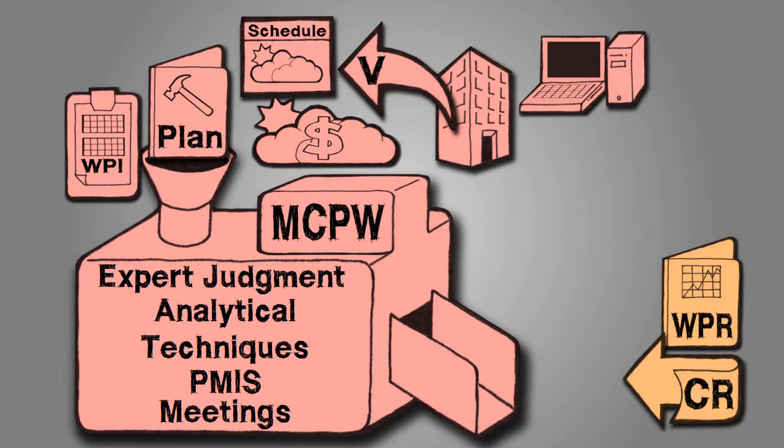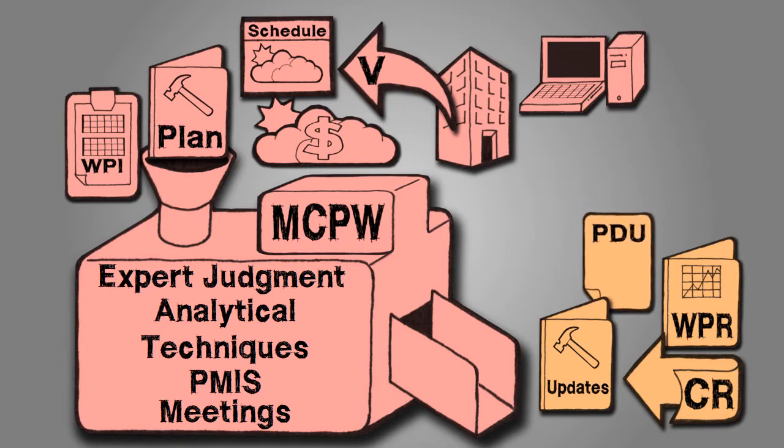Anytime a change has been approved, project management plan updates need to be completed in order to reflect this change. Just like plan updates, project document updates to any logs or forecasts need to be revised in order to keep track of all the changes made during the project.